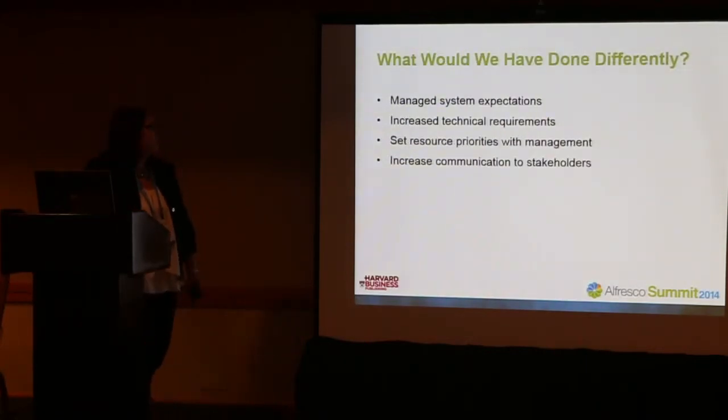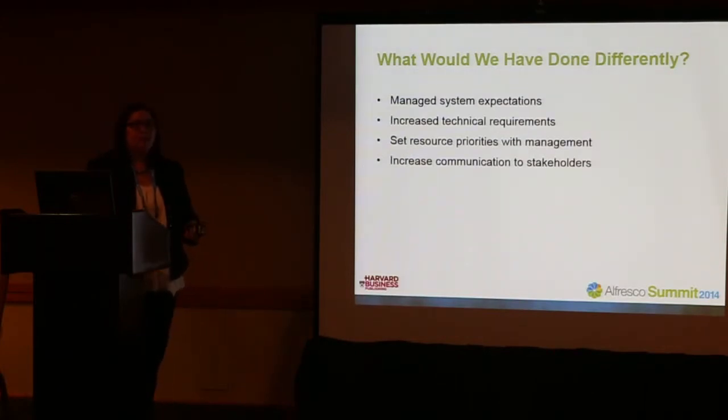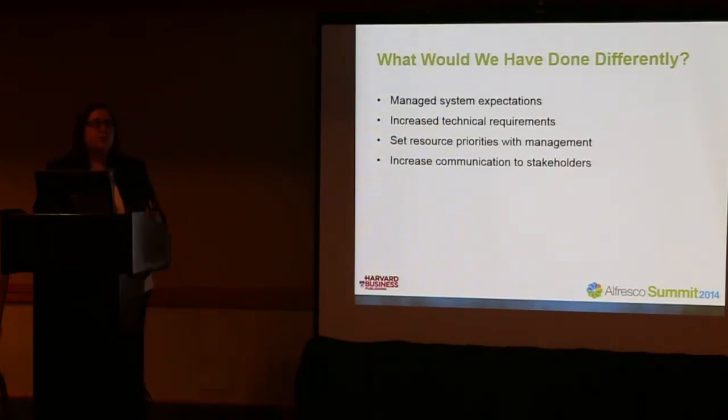So what would we have done differently? Definitely manage the system expectations. Speaking as somebody from the business unit side, I can say that there's more I could have done here. I think we could have done road shows in our own units to really explain what the system would do. Knowing what I know now, I think I would have done that. Could have hijacked a full staff meeting, maybe done some demos. There's more we could have done to really show what the final product would be, and more importantly, what that would mean, what it would do.